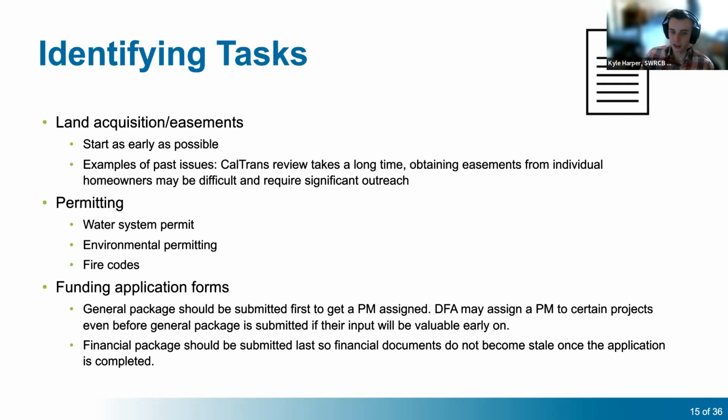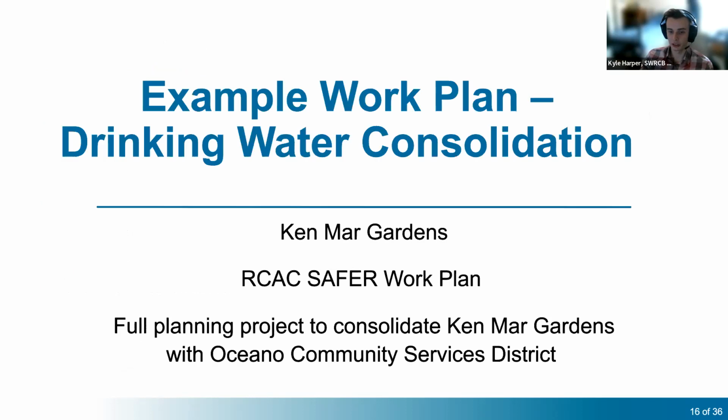And I guess on the other side, the financial package should be submitted last. The financial package should be submitted last so that financial documents do not become stale once the application is completed. We will be going over specific work plan examples, and we will also point out the general package, financial package, deliverable due dates. Now then, we will start going over some work plan examples.